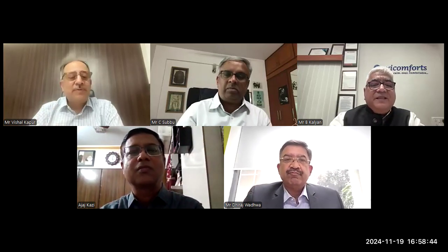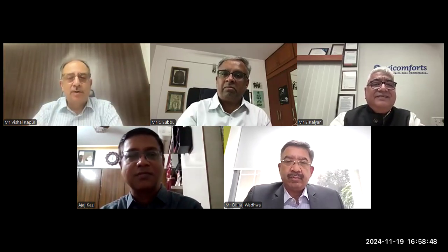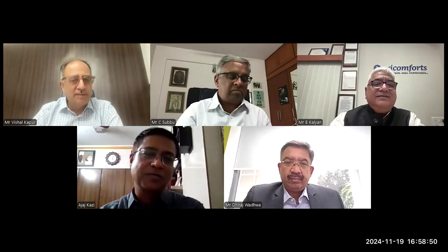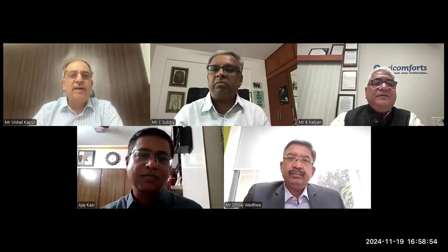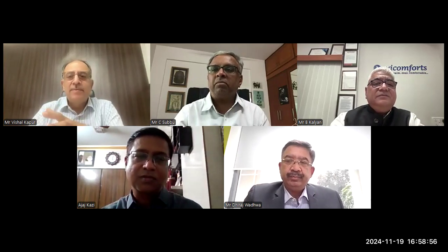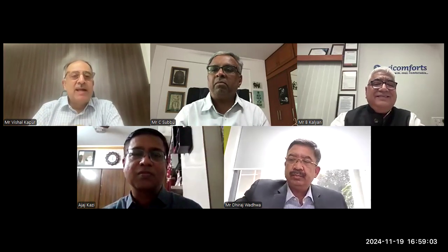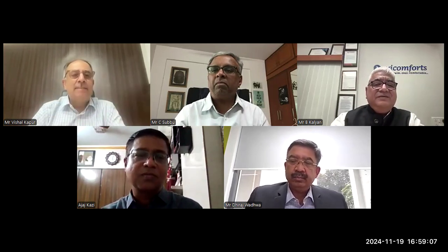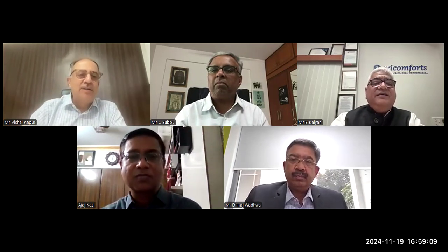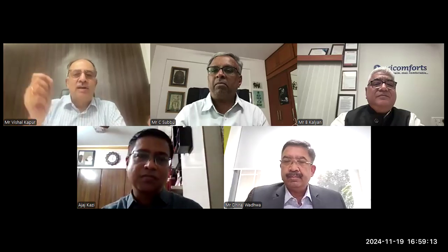I'll tell you what, ISHRAE has done a lot of work on commissioning, and Ijaz has been part of the team that wrote a commissioning guidebook. There's a commissioning certification course that ISHRAE runs. We have a few certified professionals in the country today in that field. The main concept of commissioning is that it's supposed to be third party, not second party. And the commissioning agency technically should be on board at the same time as the contracting party, not at the end of the whole project. And it's not happening. It's coming in, but in not even 0.0001% of the cases.